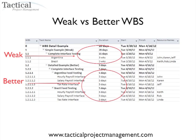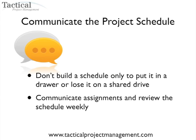PMBOK will tell you that a 40-hour work package is one guideline to go by. If you feel you need to break it down further to get better control, it's your project schedule and your deliverable. You want to build it in the way you can best manage your project and help manage the team.